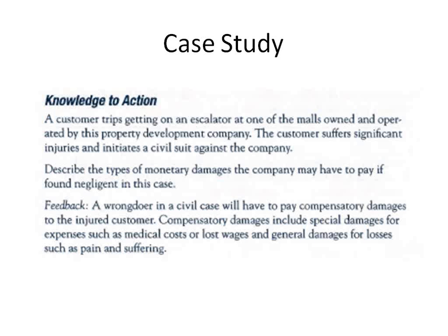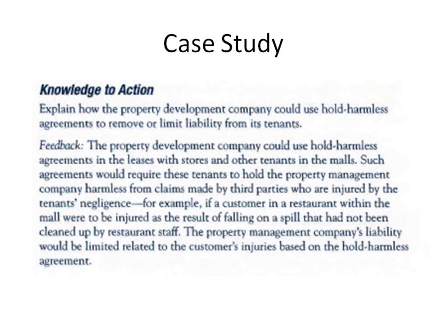In this case, the person should know how to get on and off an escalator, and it wasn't because of failure of the equipment per se. Or if there was a failure of the equipment and you have a contract, whatever claim you pay, you subrogate against the maintenance company, saying, look, you did not maintain this up to the requirements that we expect. Just because you get sued doesn't mean you don't go after someone else in the process. Subrogation is that process.